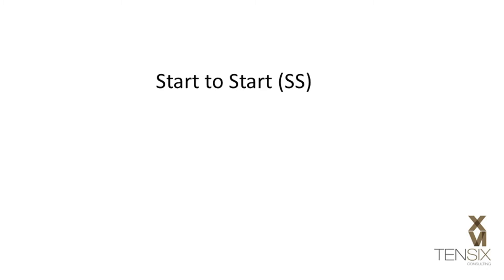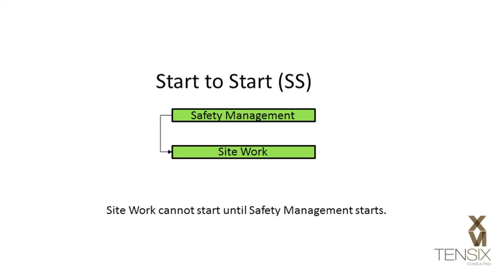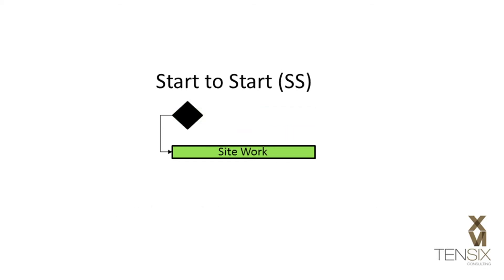Start to Start is used to describe a starting dependency between tasks. In this example, the site work activity cannot start until safety management starts. This type of relationship is commonly used with start milestones.